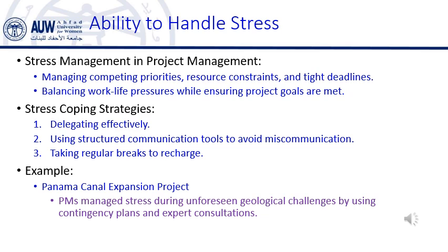Setting realistic deadlines. Setting achievable deadlines for the project, and breaking larger tasks into smaller, manageable chunks, can prevent unnecessary stress. Example. Imagine a PM overseeing the launch of a new product. By breaking the project into smaller milestones, e.g., market research, product testing, marketing campaigns, the PM can focus on one step at a time, reducing the stress of trying to accomplish everything at once.